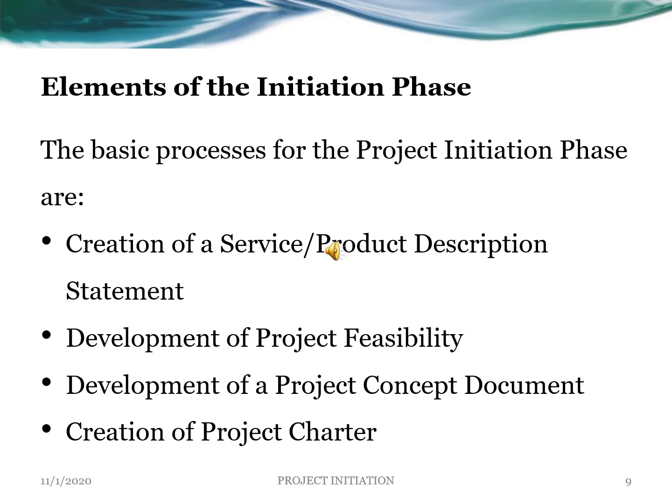The elements of the initiation phase, in fact the basic processes for the project initiation phase, are firstly creation of a service product description statement, development of a project feasibility, development of a project concept document, and creation of a project charter. We will cover all these elements during our session today.